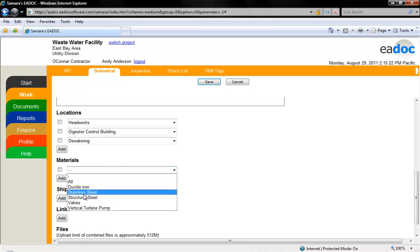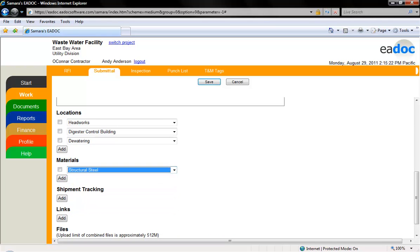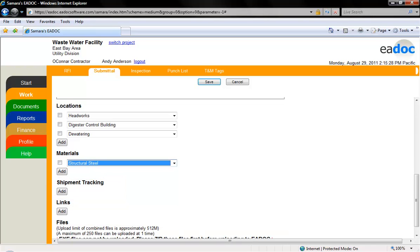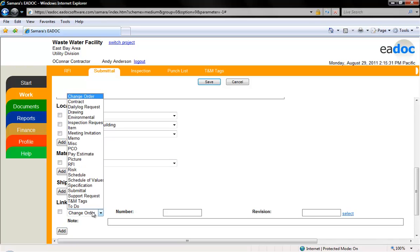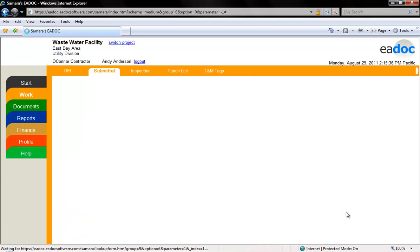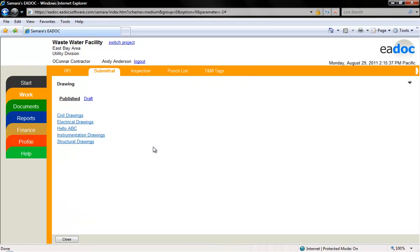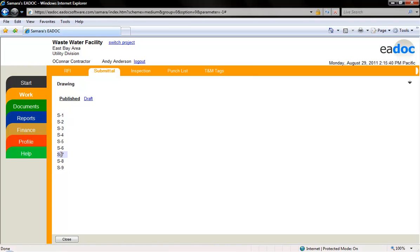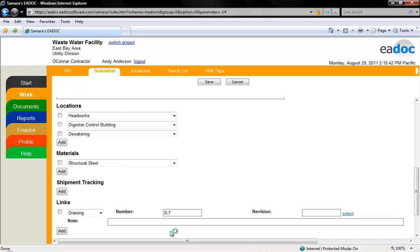If there are any samples or other physical materials that need to be shipped to the reviewers, you can add it under the shipment tracking section. If there are any documents in eDoc you would like tied to the submittal, click the add button for each link you'd like to add. Select the type of document from the drop-down and then click the select link on the right side. This will take you to a new window to locate the document within eDoc.